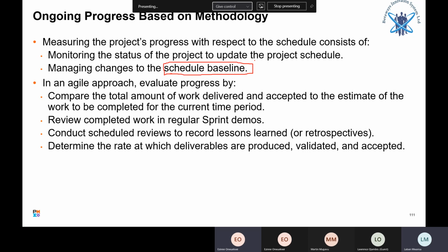Because in the project closure report, we must be able to have the final schedule compared to the baseline and what has changed in the project, and that can create lessons for future projects. And this is why we must keep the baseline, not overwrite it with change requests.